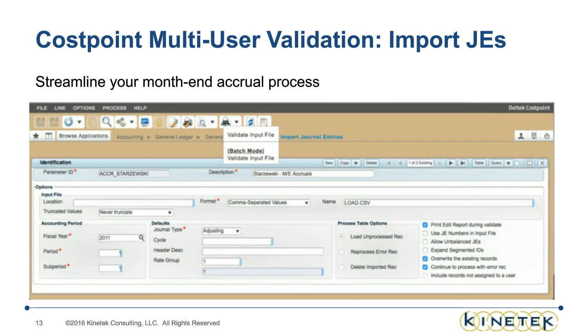But the problem when we get into things like subcontractors, where we've got a PO that's maybe going to go on for a year, maybe 2, 3, 4, 5 years, is that I can't sit there and accrue the entire PO for the remainder of the 5 years every month, because that's ridiculous. What I really want to accrue is the amount of cost, in hours if it's appropriate, that is equal to what I believe has been incurred or expended by the subcontractor in a particular month.